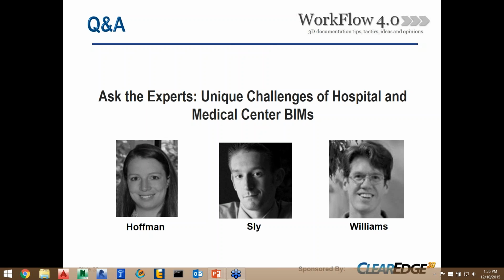There are projects where we had started them, there was no scanning budget, and we found it as a benefit. So we submitted how long it would take and submitted that budget to the owner for approval because of the cost savings it would have. We would present a case scenario of, okay, if we don't scan it, this is what we have to do. And if we do scan it, this is what we're going to save. Same for us. Okay, yeah, it makes sense.